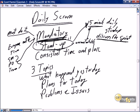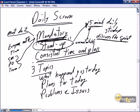We want to strive for consistency. If we're going to expect — and demand — that every scrum team member participates in every daily scrum, we need to have consistency and predictability. It should always take place at the same time and the same place. Pick a consistent time and place that works for everyone, or is the least inconvenient, and stick to that.